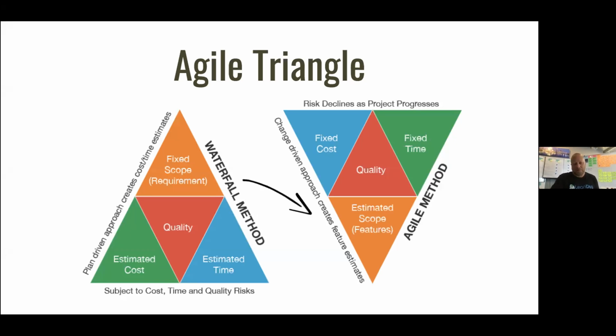With Agile, what we're doing is we're fixing the team. So we're establishing whole standing teams. As soon as we do that, and Scrum will tell you a team size is 7 plus or minus 2, I can tell you from experience that we like bigger teams, 12 to 16 people per team. And there's a reason for that.